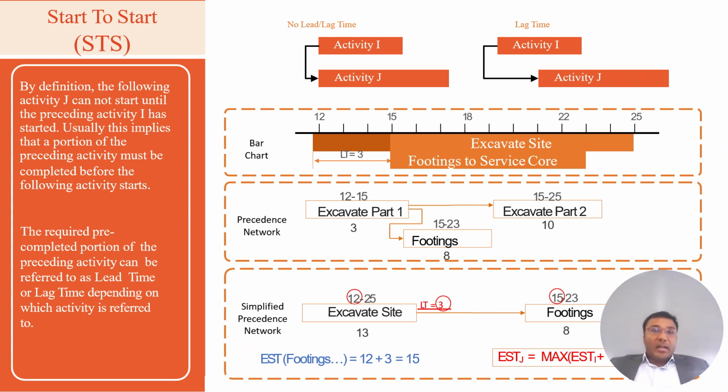So how do we calculate the early start time for the footing, which comes from the early start time of excavation plus your lag time, which is 12 plus 3 equals 15. So the footing activity will start on day 15. This overlap shortens the project duration but requires very close coordination.